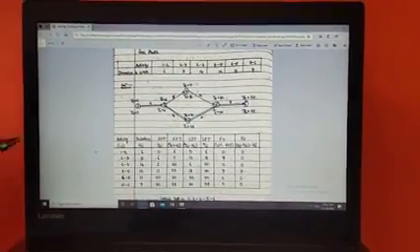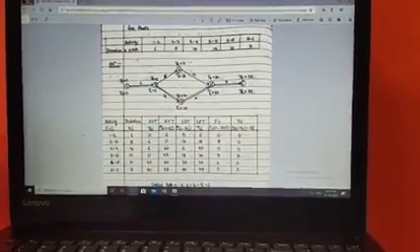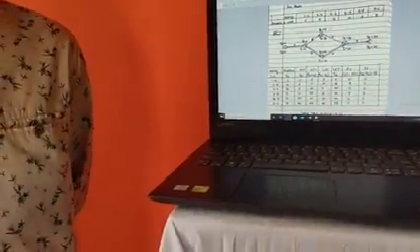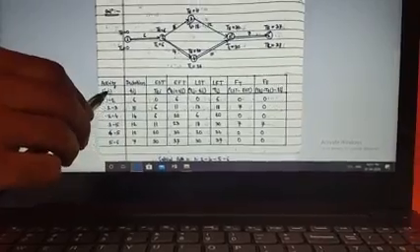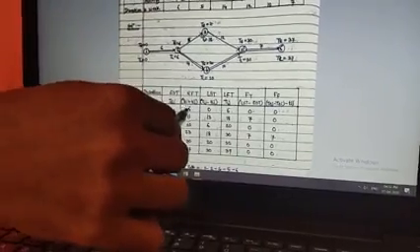So with this, now let us go for the next one, that is early finish time. Before I explain how exactly these numbers are to be calculated, the meaning of EFT is very simple. Early finish time. That means at what particular time each and every individual activity is going to end or finish off. So now again let us go one by one. Consider 1 to 2 as our first activity. When exactly is this activity going to end? The very simple answer for that question is after spending 6 weeks. That is why I have written here 6.